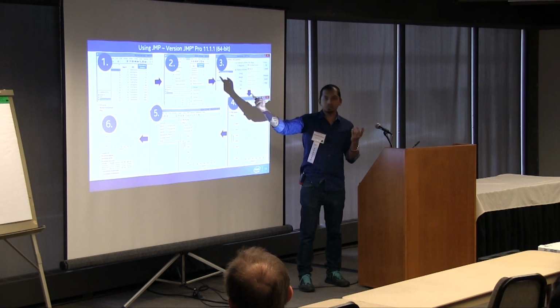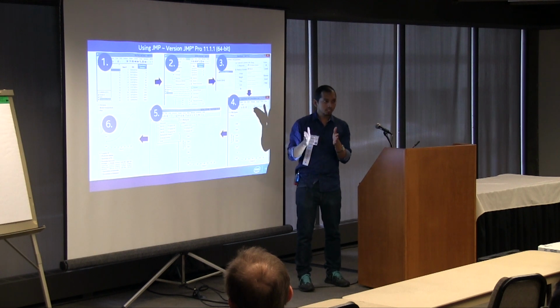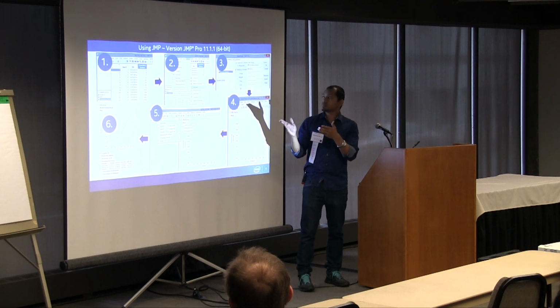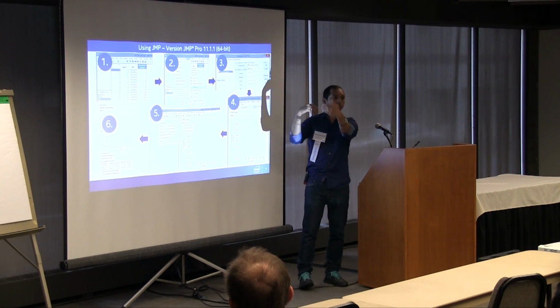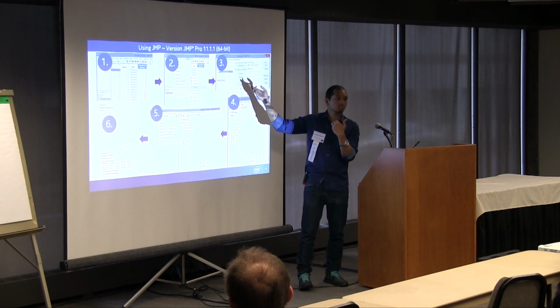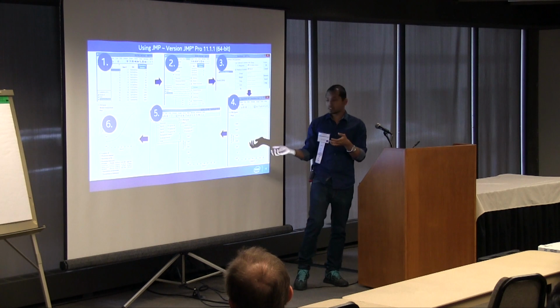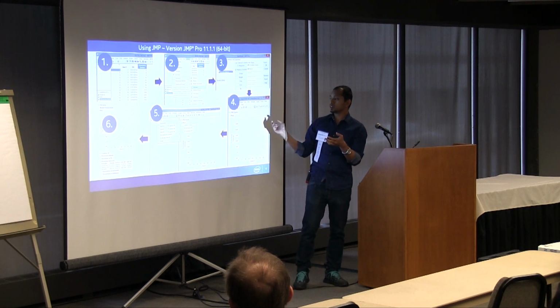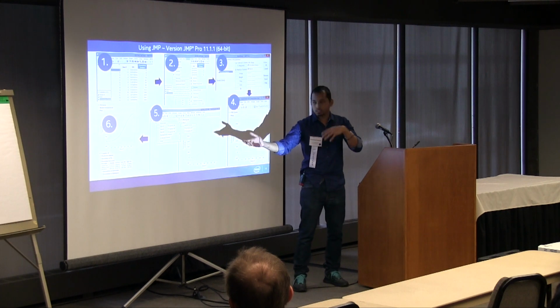In the first step, you have the data table of all the work weeks with respect to the defects. Second step, you say that you're using a nonlinear model. Third step, you define the parameters, where the x-axis and y-axis are your cumulative defects and work weeks. Your fourth step is your actual plot, as you can see over here, the dotted lines. And the fifth step is to fit this using a logistic curve.